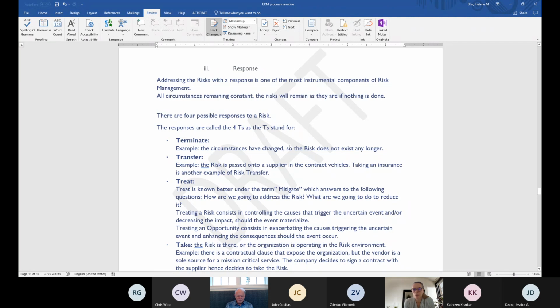And we are using the term risk appetite really for an enterprise at a company level. If we are talking about a project, its appetite and its tolerance are the project objectives, meaning that you have a budget, a schedule, a quality, and a contract. So the boundaries of your tolerance are inside the budget, the contract, the schedule, and everything.